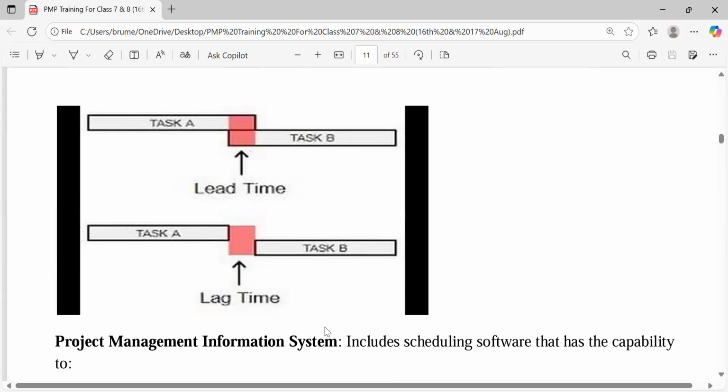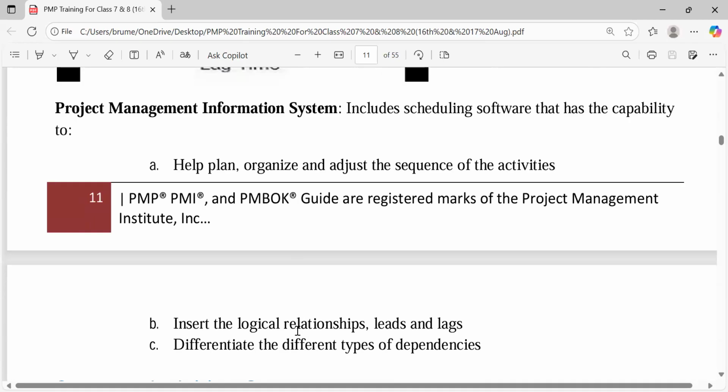Then we looked at the same activities and we saw that one was over and yet the other did not start. The predecessor was over and the successor did not start. We waited a couple of days, couple of minutes, couple of hours to initiate the successor activities. And I told us that is a lag.